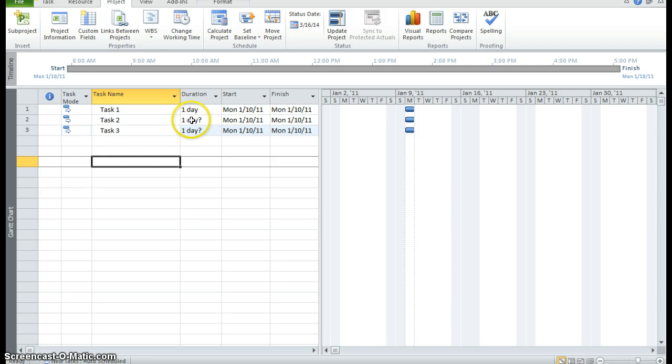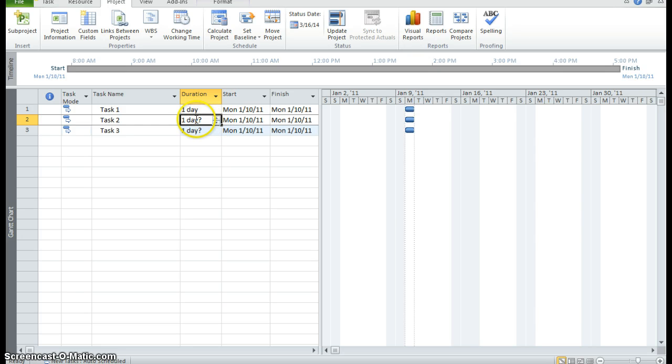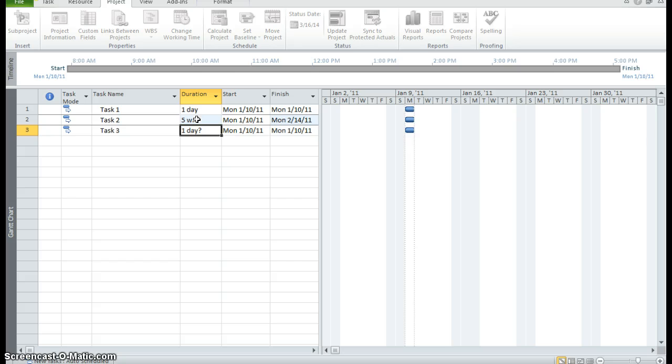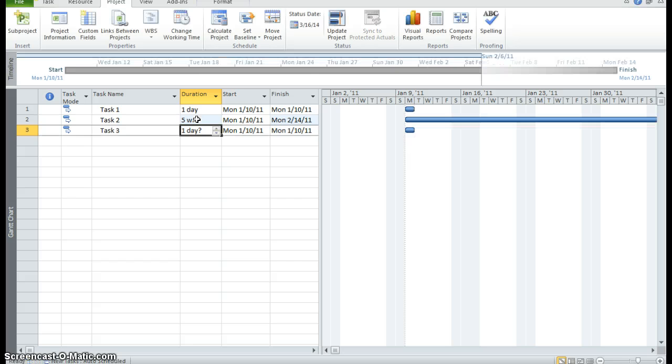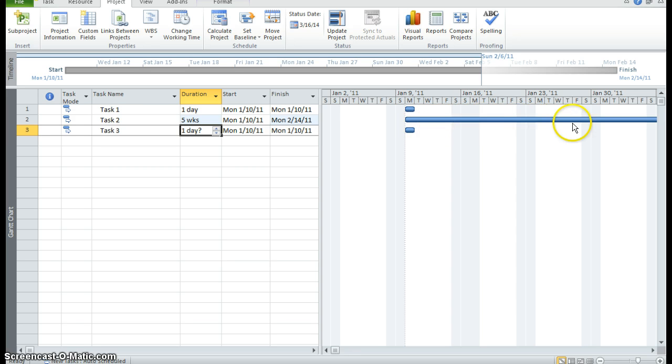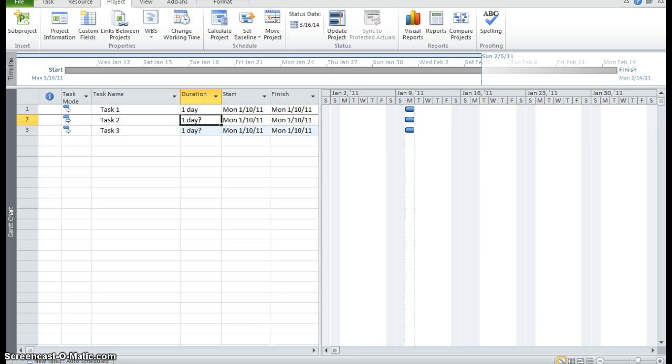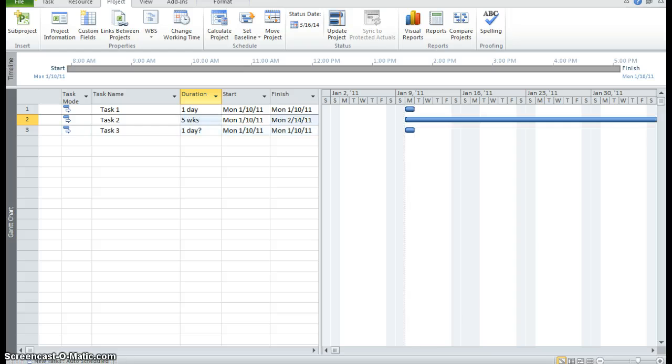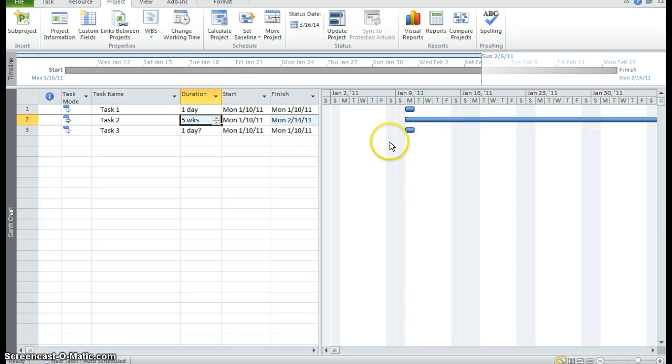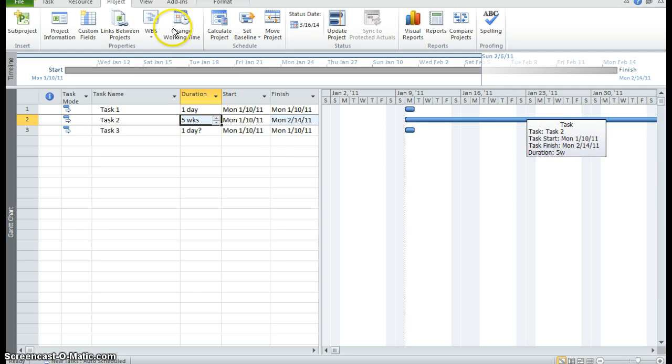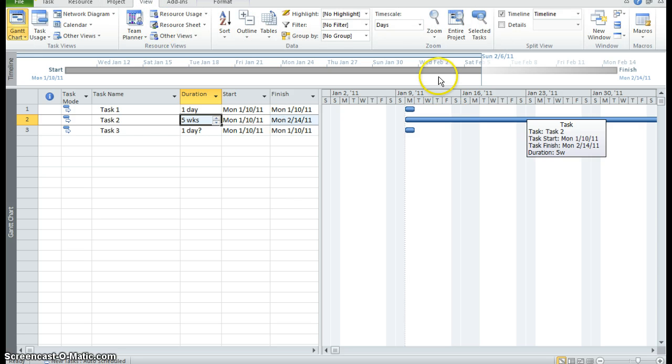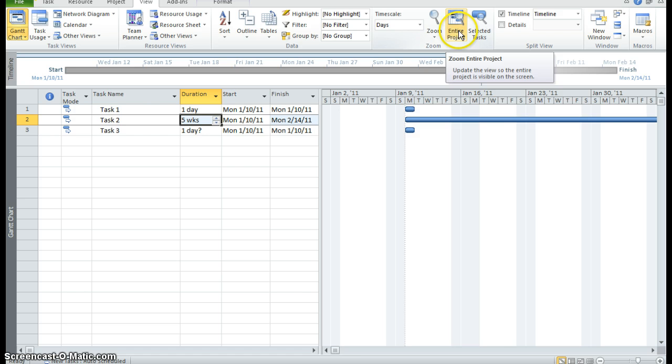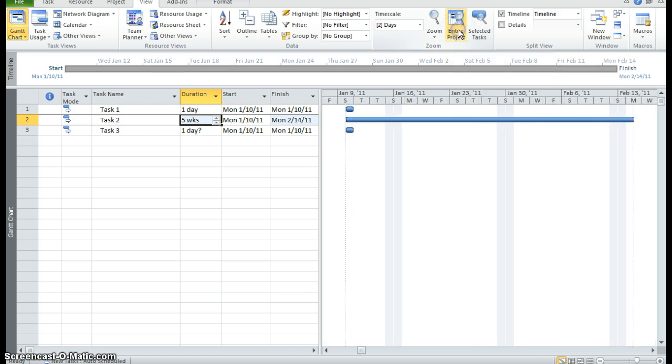And I'm going to say that task 2 is going to take at least five weeks. So I'm going to put 5W and enter. You can see to the right on my Gantt chart, my bar went out. Let me just undo that and then redo it so you can see how small it is for one day. And then if I redo it, you see it goes out for five weeks. I can click on the view tab and click in the zoom group and click on entire project so that I can see exactly how far this bar is going.